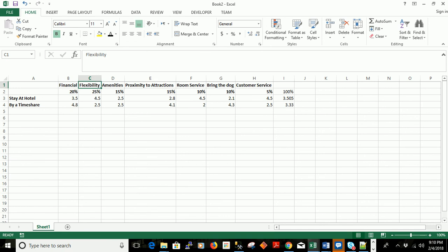And a lot of times when you're doing a baseline project plan, the baseline project plan kind of hinges around this feasibility analysis where you're showing all of these weights on all of these factors as kind of the main part, up top on the document. But you might have an appendix that backs up each one of those claims. So you might have an appendix that describes the operational feasibility issues. You might have an appendix that describes each alternative's technical feasibility issues and why you ranked each one the way you did. And you can even sub-rank them within the technical feasibility. Say the overall score is this because of all these different factors that we took into account. So you can get very granular.